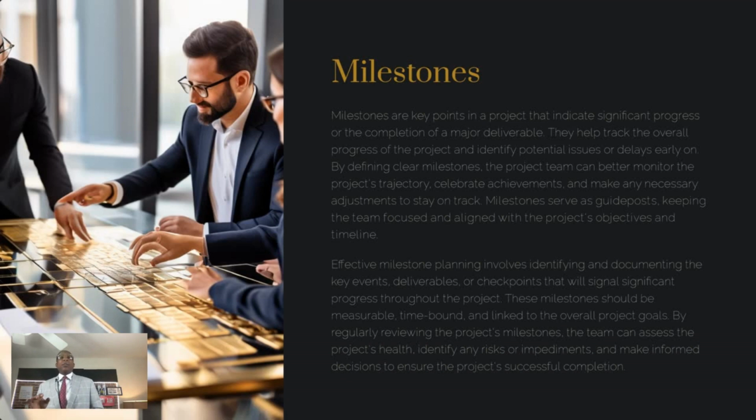Once these tasks are completed, this milestone is done. When you're building out your milestones, you want to make sure you have effective milestone planning, meaning ensuring that your milestones are measurable, time-based, and linked to the overall project goal.